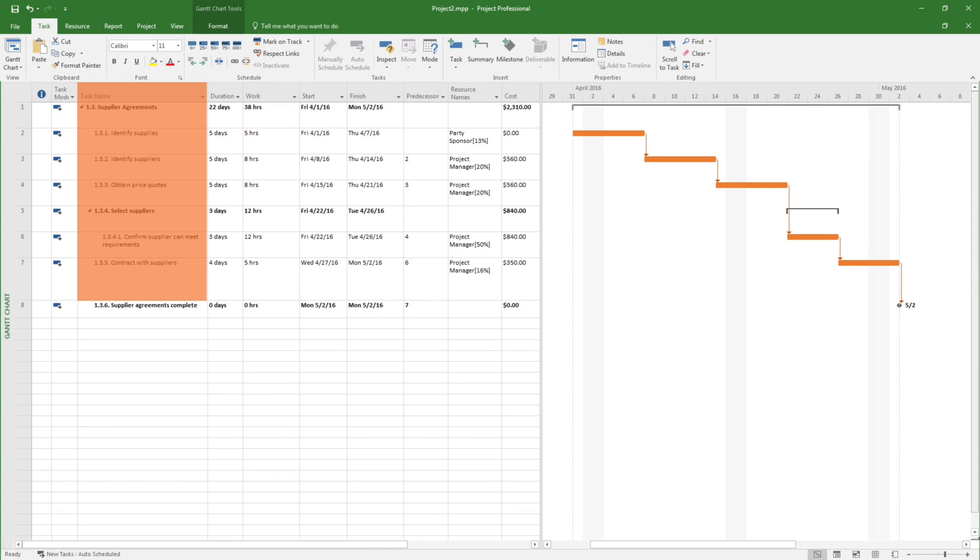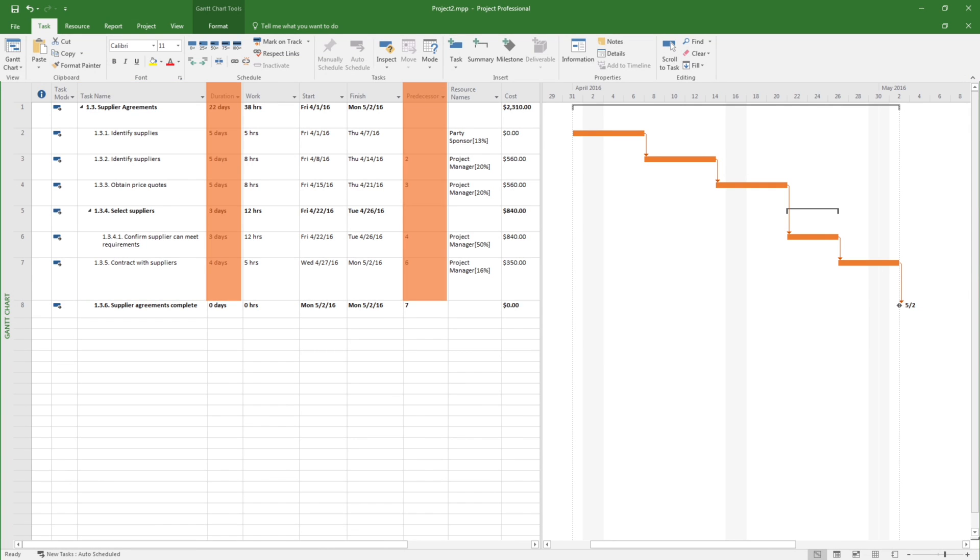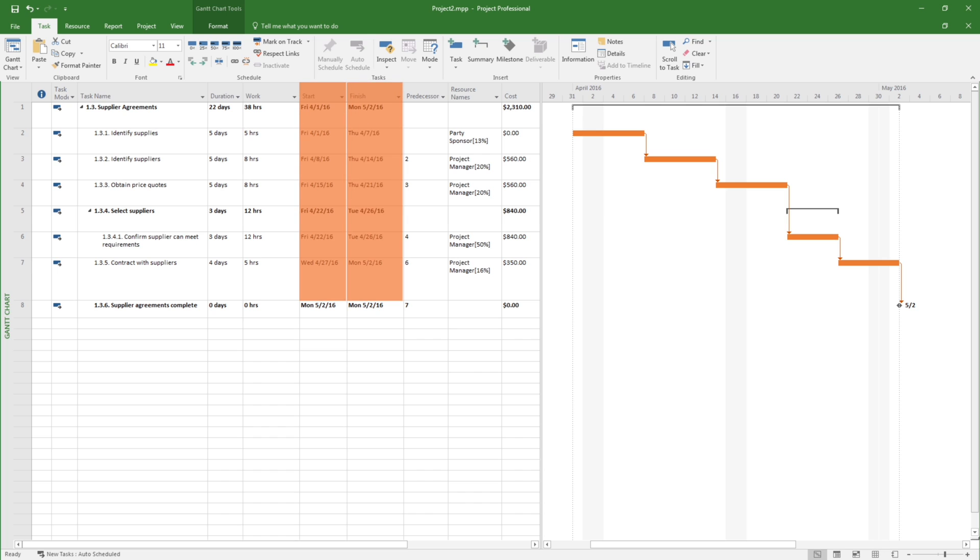The Project Manager enters the activity durations and the predecessor relationships. Microsoft Project automatically calculates the start and end dates by conducting the forward pass.